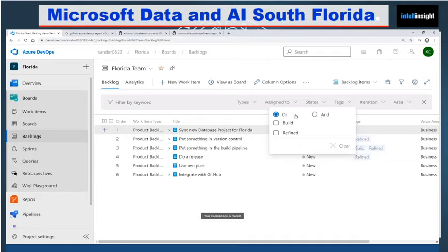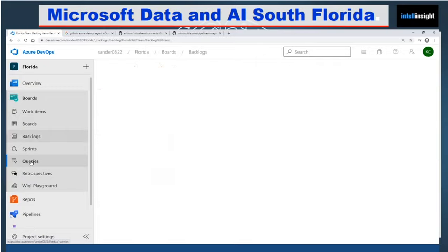Yeah. Well, we have a couple of options here. Either we can move the item straight away to a future sprint once it's refined, which means we have to make sure that we don't forget to allocate it to that sprint. Or we can use beautiful queries to show only backlog items that do not have the refined tag. Of course, everybody, they're not called beautiful queries, it's just a nickname for them.